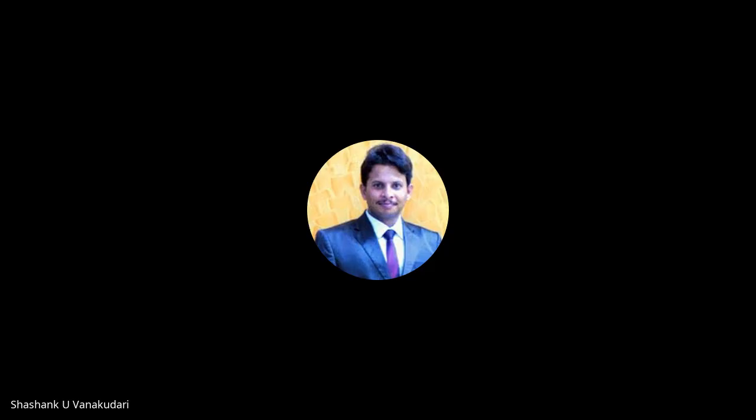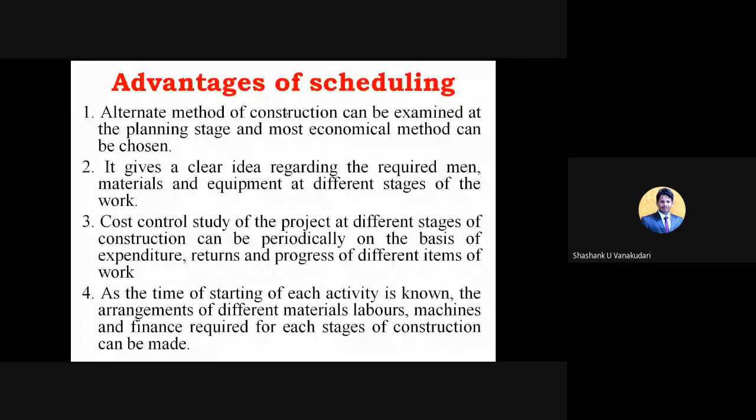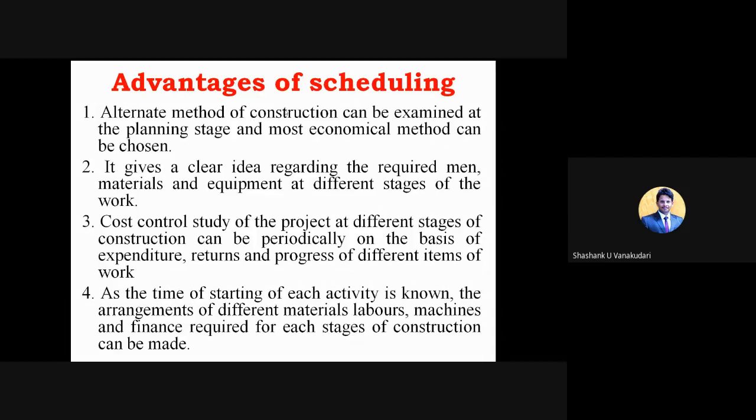And when the activity is known, you'll know what exactly you want to do in the next week. So in this week itself, you are preparing those requirements such as materials, labors, machines, and whatever the necessary requirements are, keeping them ready one week before, so that at the time of execution it should not be delayed with respect to these resources. So we can achieve that process by using this scheduling part.